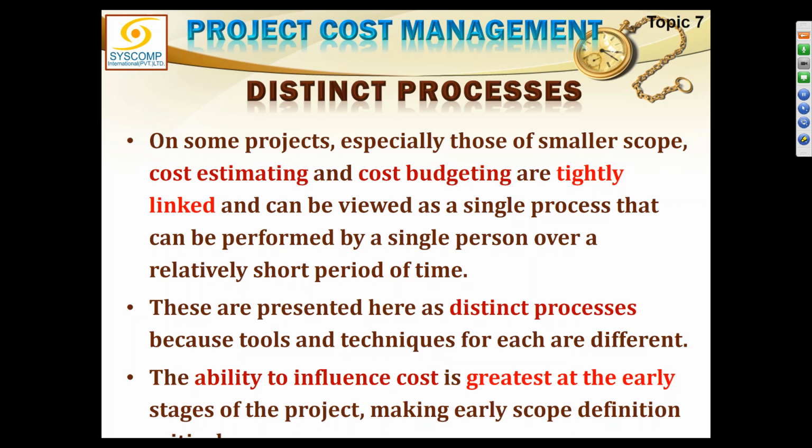Why? Because when we are estimating, we say this job will take 35 rupees. And if we recognize a variation right now, we see that our calculation was maybe wrong. So we can correct it immediately because nothing so far has been done. We are not yet in execution. So the cost of change is minimal in the beginning of the project.